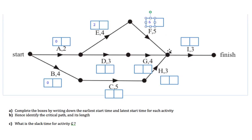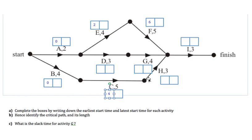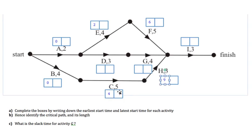Activity I has to wait for F to finish, but it also has to wait for G and H, so we're not sure yet how soon Activity I can start. Going back to the B path: B could start at zero and B takes four, so C's earliest start time would be four. Following this path along, if C can start at four and takes five, then H can begin when C finishes — H's earliest possible start time would be nine, because that's four plus five.